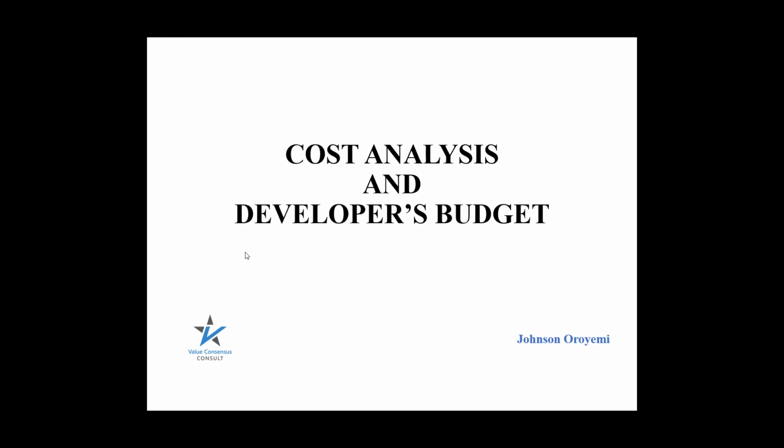So that's why we'll be going into cost analysis today, because the cost information that we are going to be using to carry out cost planning of a proposed project is not only going to be based on quantity, but also we are definitely going to have rates. Taking for instance, if we are using the functional unit method of preparing preliminary estimates, we are going to have units. A functional unit may be in terms of bed space for hospital projects, or in terms of car park space for a car park project.